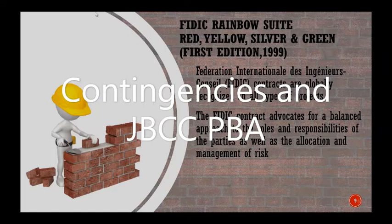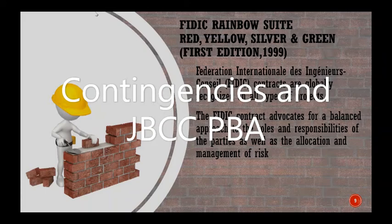Morning Sean and colleagues. I want to concur with what France is saying as well as the previous speaker. My take is that in government, what generally happens — and France, you're quite correct that we shouldn't put contingency as part of the contract value — but often when we award in government we add it as a contract value, and then it becomes a sort of open checkbook for contractors because they see that contingency, which is most of the time either 5% or 10%, and they find a way of utilizing it. We've also got the IDMS — the Infrastructure Delivery Management System — which was seemingly taken over by the FIPDM.